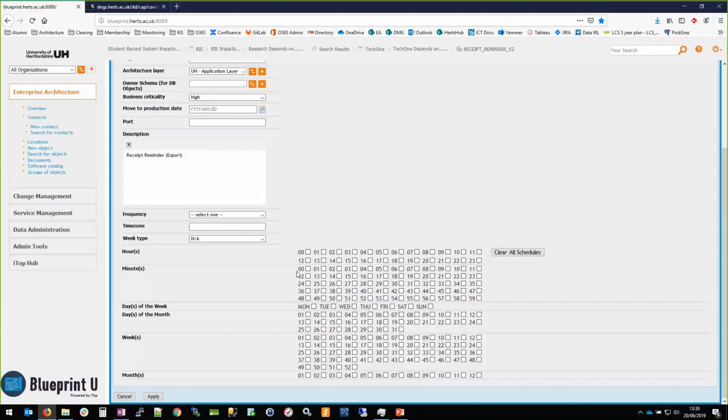What do we do? Also, on the inverse of that, because we know that we're about to do some change on a system, we can start to think about our stakeholders and how it's going to work. So, for example, we're now looking at pulling in annual leave calendars from HR. So we can think about if we've got a particular piece of change coming, does it affect the data feeds? Does it affect the backups? Does it affect what staff are available at the time?